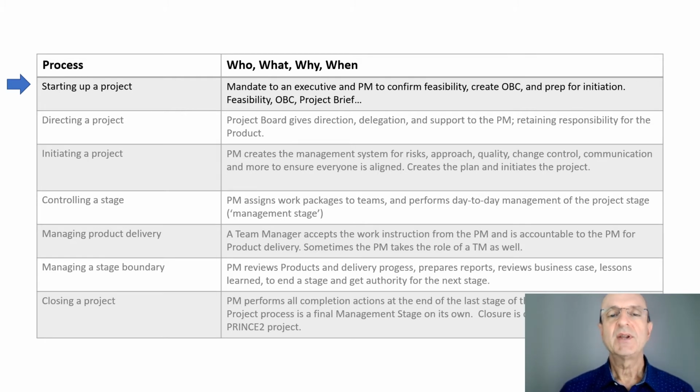So the end of the starting up phase is actually putting a project brief together for whoever commissioned you to do this investigation. And they will then decide whether you go forward into actually initiating a resourced, budgeted, financed project.